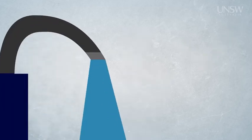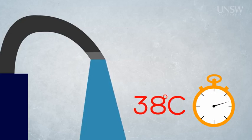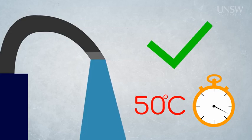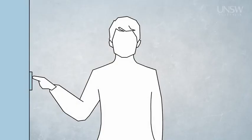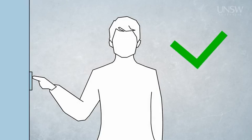Tests. If we wanted to confirm that the hot water at a certain temperature was delivered to every tap within X seconds of turning on the tap, we might use test equipment, like a stopwatch and a thermometer, and an agreed test procedure to measure the time it took for hot water of a given temperature to be delivered. Note carefully that testing normally involves test equipment, measurement, and data collection. Demonstration. If we wanted to check that all of the lights were working, a simple walk around and a demonstration of the lights might be sufficient.